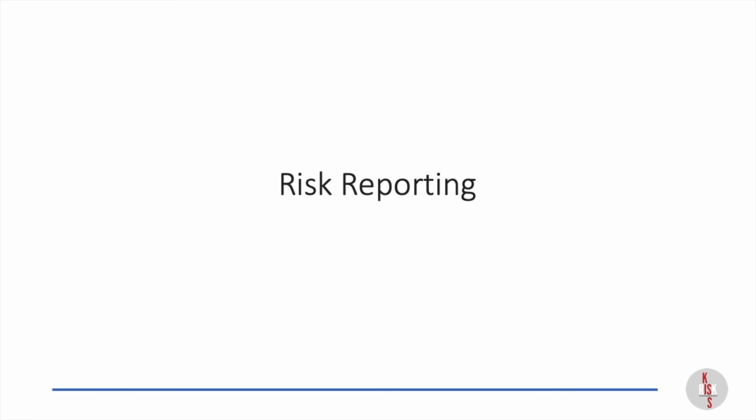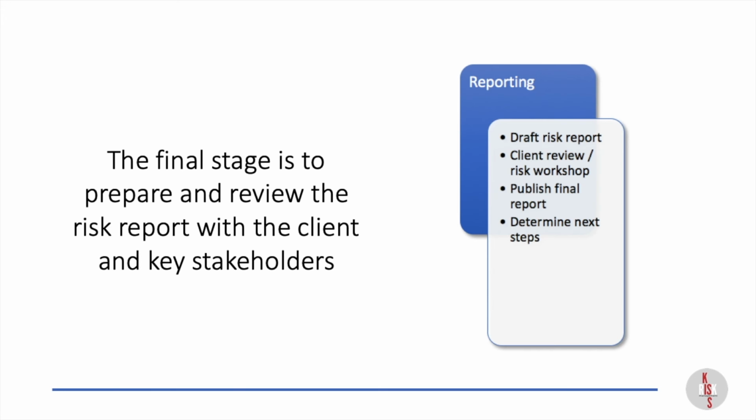Now that we have all the information, we're going to report it and present it to the decision makers, so the client or key stakeholders. Those could be internal or an external client. They need the information. So the first thing you're going to do is take your assessment and draft a report, in whatever format is most appropriate. It could be a dashboard in a piece of software, some graphs in Excel, a PowerPoint presentation, or a written report.